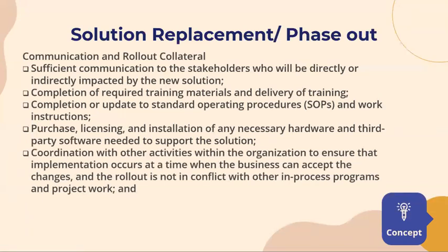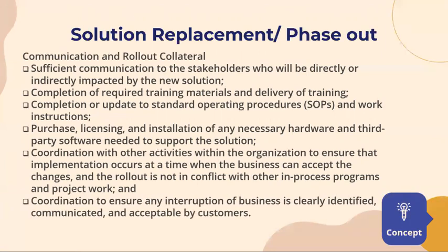Coordination with other activities within the organization to ensure that implementation occurs at a time when the business can accept the changes and the rollout is not in conflict with other in-process programs and project work. And lastly, coordinate to ensure any interruption of business is clearly identified, communicated, and acceptable to the customers.